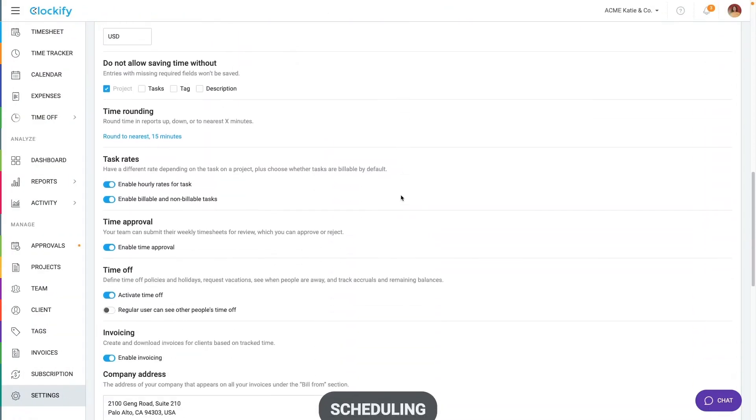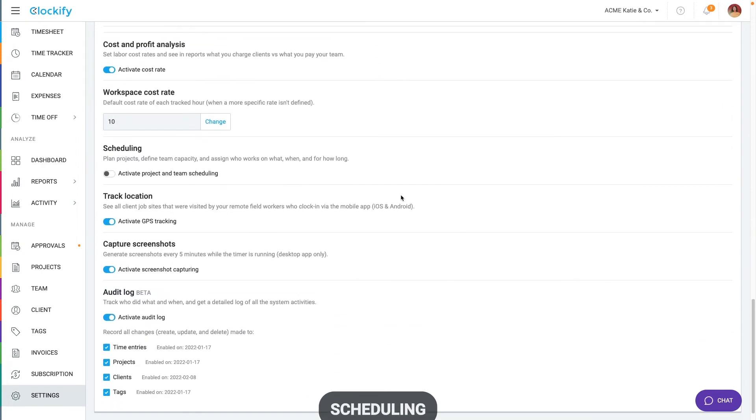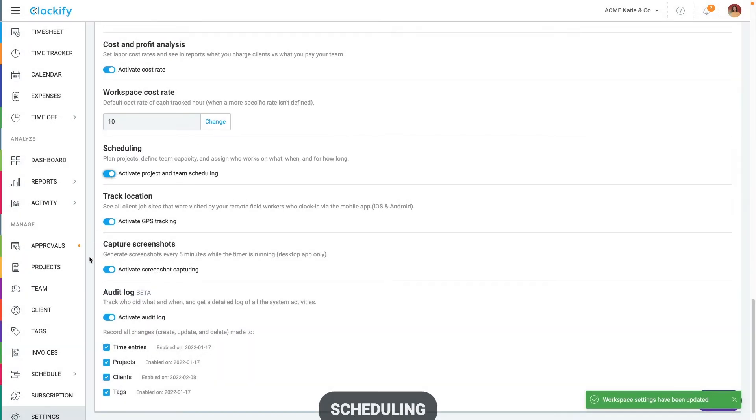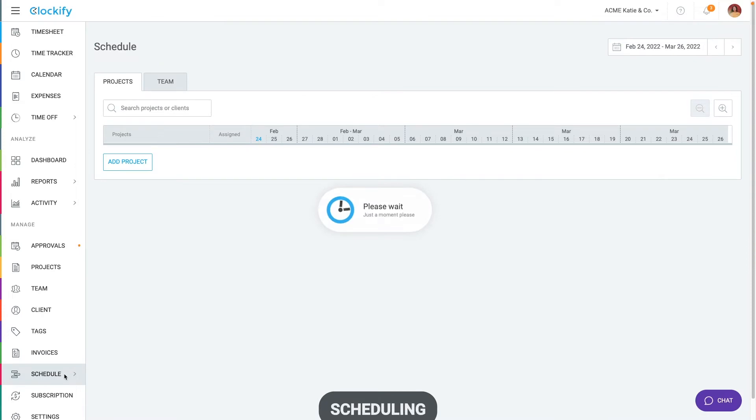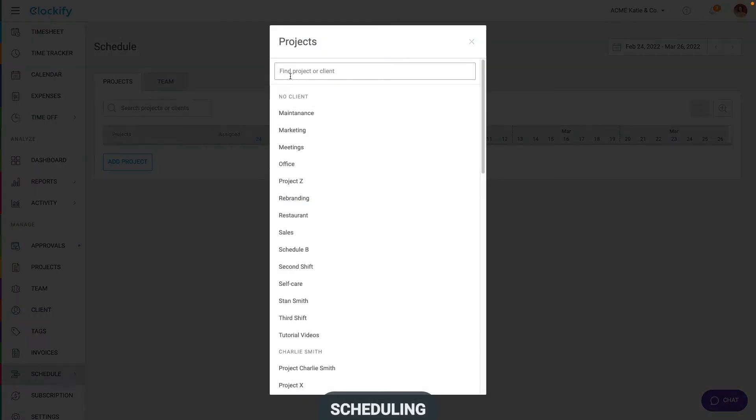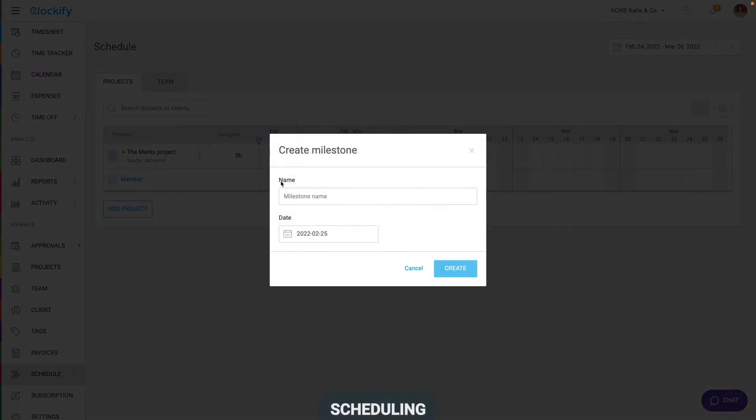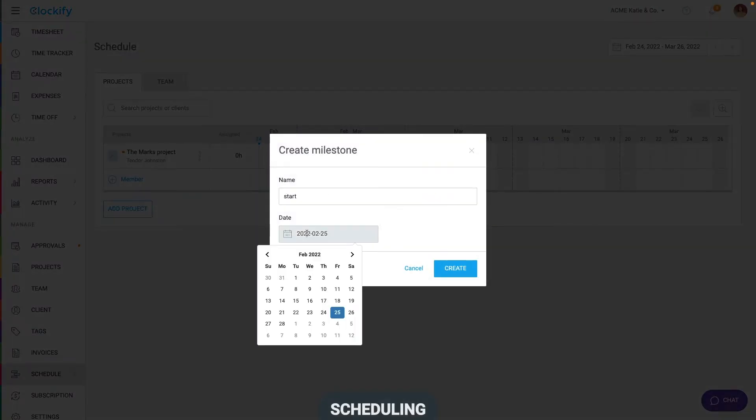Let's now cover how to plan work on your projects. Enable scheduling in workspace settings and go to the scheduling page. When you arrange a project with a client, you can add the project here and add milestones like project start and finish.